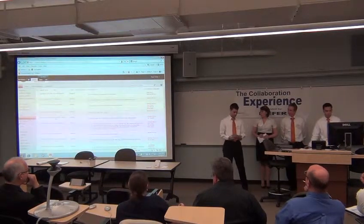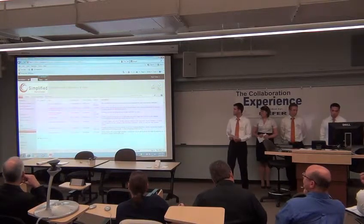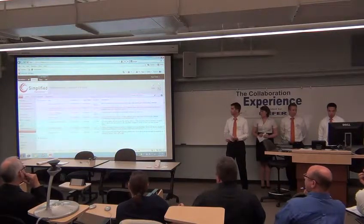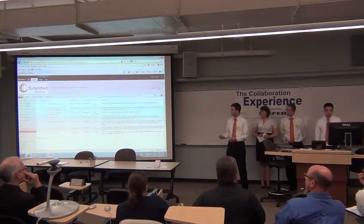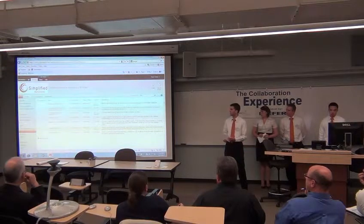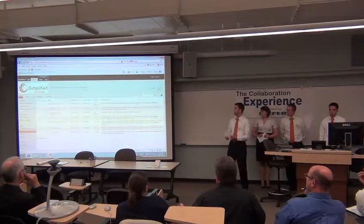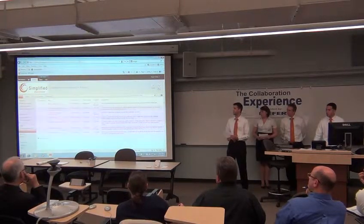Another log that we found particularly useful was the issues log. Since we're not always able to work together, we all have different schedules. Sometimes we would encounter problems when we're away, and so if we did, we could just easily come here and post our problem and put a description in it, and that would allow one of us to click on it, write a comment back to it, and then if we wanted to go even further, we could click on their contact and talk to them directly.